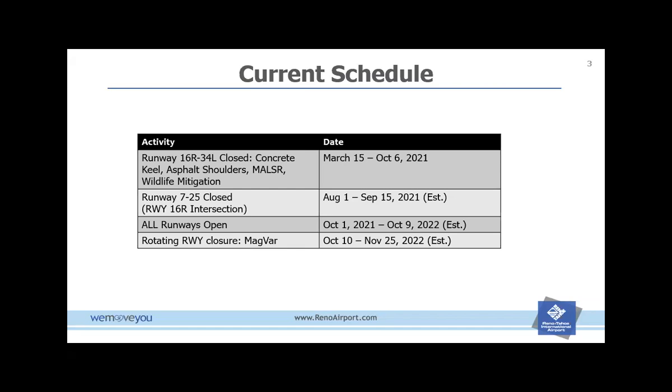But mind you, if you think about it, the contractor does need to demolish, tear down, and each layer of construction materials, build those back up. Not to mention the concrete needs to attain a 28-day strength. So if you throw the 28-day strength in there within 45 days, it doesn't give them a whole lot of time, but some of these concretes do attain strength before that, and hopefully we can open it earlier than the September 15th.